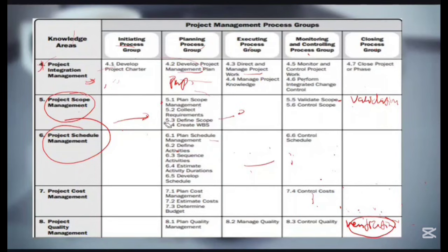But which one should come first? Should you verify before you validate, or you validate before you verify? You verify before you validate. Verify before you validate. That's it. Now you see, project management is common sense. We shouldn't struggle. And there will be questions on this. What do you do next? Verification should come first. So we verify, which is internal.